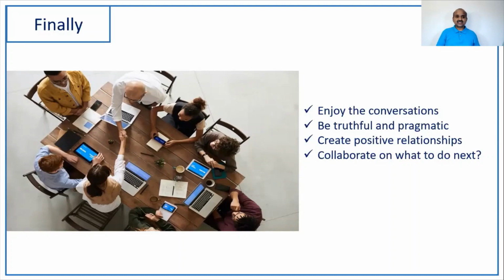Otherwise, product owner can also say, guys, next sprint, 80% of your bandwidth you reserve for stories, 20% of your bandwidth you reserve for production incidents, because our stakeholders are really uncomfortable with the production incidents. So then collaborate. See, just don't show the contract saying that, hey, I'm only responsible for development. No. Take the perception of the product owner or stakeholders, the end consumers, and collaborate, right? Okay, I have 5 stories in my pocket, out of which you want me to work on these 3, and remaining these 2, you wanted to change with other stories, that's okay.